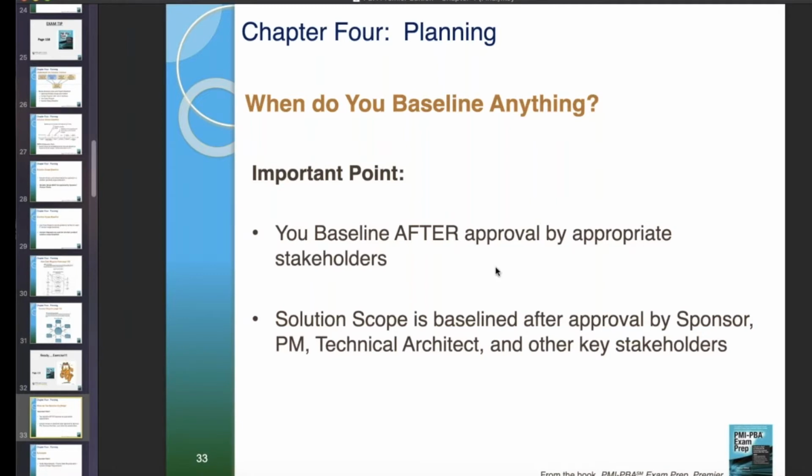The when is important. You baseline after approval by appropriate stakeholders, like we've said. Solution scope is baselined after the approval by the sponsor, PM, technical architect, and any other key stakeholders.